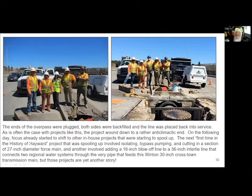When all was said and done, I want to say that we spent right around $360,000 on this project, which is unheard of. I mean, we were $30,000 into this just to find out that we got nothing done when this whole thing started. Had we brought in the engineering firm and the consultants and then the contractors, and had they run into all of the problems that we encountered, with change order after change order, this would have been an incredibly, incredibly expensive ordeal, and one that we wouldn't have felt very good about.